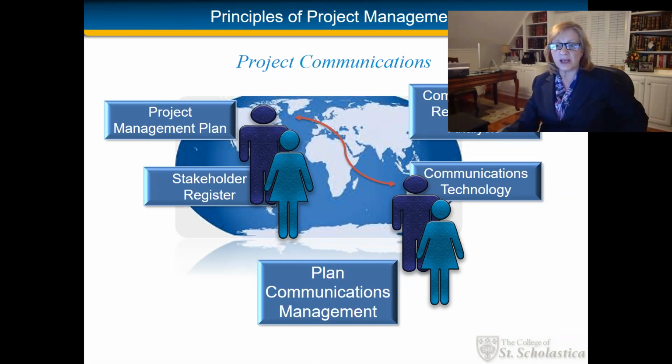The communications plan will become an integral part of your overall project management plan, so you want to take the time to map out the flow of information to your different stakeholders or stakeholder groups. Project communications management planning will help us determine who needs what information, when or how often, and in what format to disseminate this information. Through this planning, we should be able to describe who will produce this information and who is responsible for its dissemination.